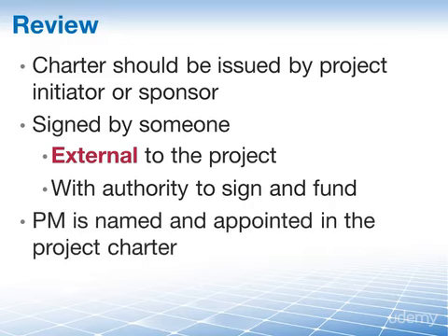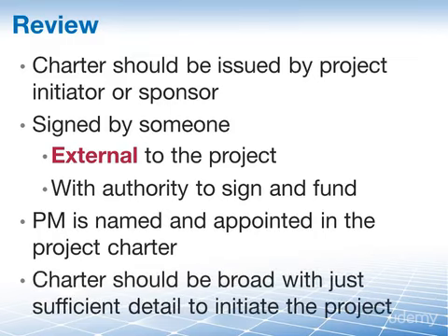The project manager is named and appointed in the project charter, and the project charter should be broadly based with just sufficient detail to initiate the project. And why is that? Extra detail this early on in the project wastes time prior to initiation, and as you don't know a great deal at this stage, it's just a waste of time. If the project charter is broad, you also won't need to change it too often during the project.